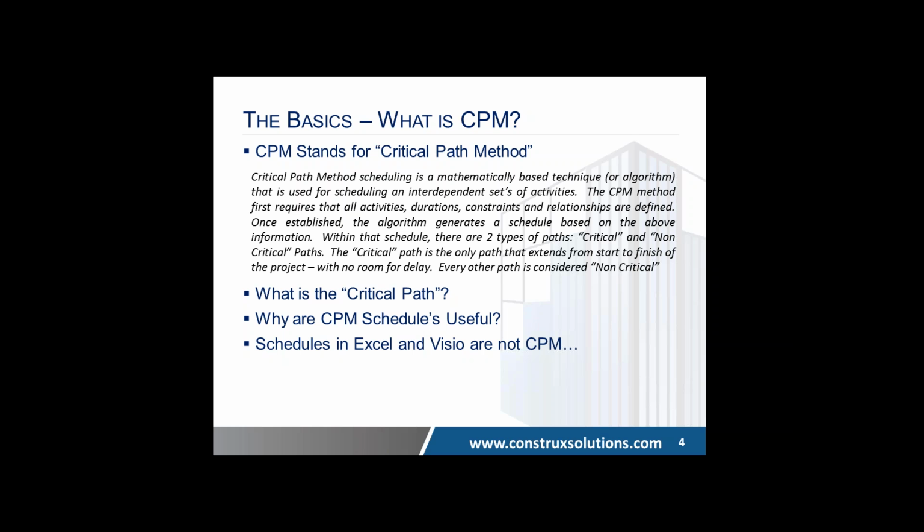One very important point that I'd like to make is I've worked with a lot of contractors. I've worked with a lot of trade contractors. Some people like to do their schedules in Excel and Visio. These are not CPM. These are drawings. One of the most useful parts about the CPM schedule is that when you perform an update and you status the various activities in your schedule, then it will actually produce a new critical path potentially. It will give you a new end date if things are delayed.